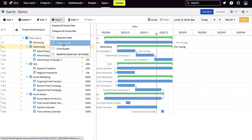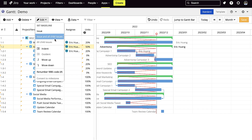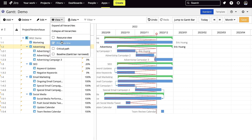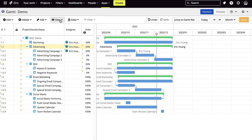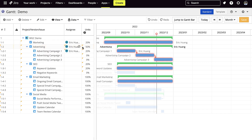For progress lines: if the lines are protruding to the left, it means that there is a delay in the progress. If the lines are protruding to the right, it means that you are ahead of your plans. Critical paths are highlighted to show you which tasks need to be completed first so that there will be no bottleneck on the project.